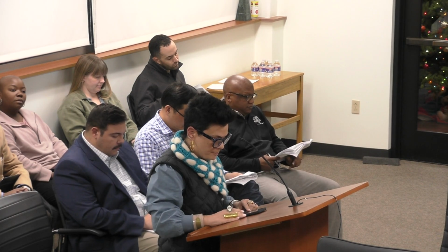So it's taken us 11 years to get here, but we are finally at this point where we can move into what we're calling stage 2 of construction. We've been doing a lot of architectural design, and stage 2 is really shoring up the remaining historic buildings. So the construction includes limestone and brick masonry restoration, roofs, windows, doors, excavation for future HVAC, some MEP, making everything ADA compliant. It also includes the pre-work of environmental testing and abatement and demolition. So it's a good chunk of work.